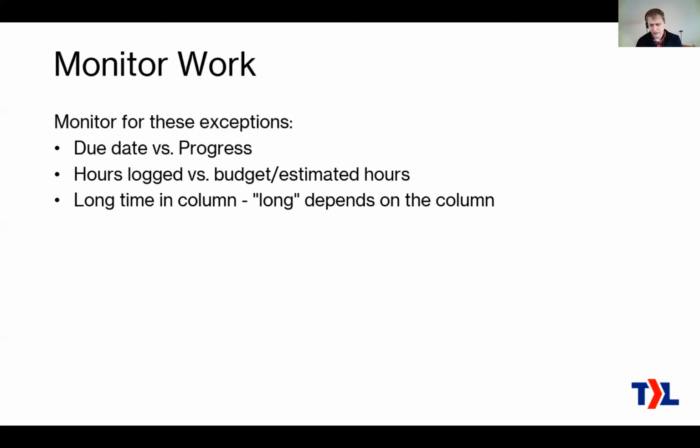The long time in column. Okay, so if a ticket, we've all seen this, tickets just kind of get neglected. They just get forgotten about, and they sit there for a long time. So that's different for every column, like the length of time that something can sit there. If it's started or in progress, you don't want it to sit there for more than a day or two before moving on, or maybe going back to waiting or scheduled or whatever. Ideally, it goes to completed, but in any case, it should keep moving through there.